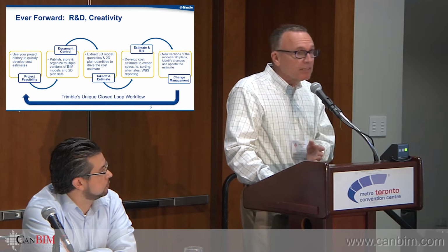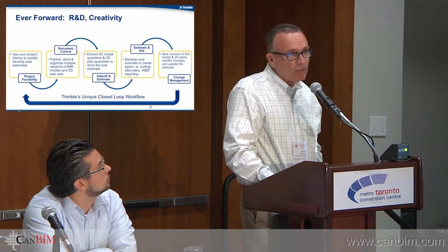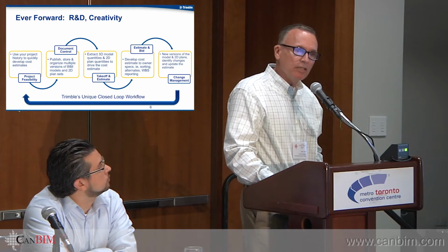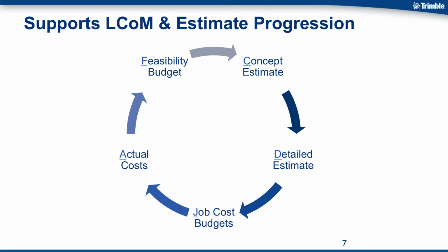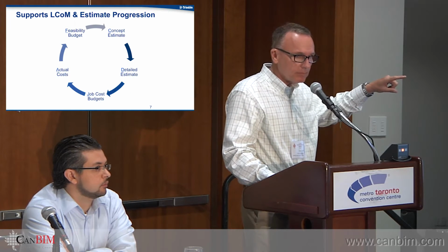Eventually, you end up with your final estimate, and that estimate should flow through to your project management software. And guess what? When that project is closed, the lessons learned and the cost information on that closed project should move all the way back upstream to that feasibility tool that allows you to respond to the next opportunity.